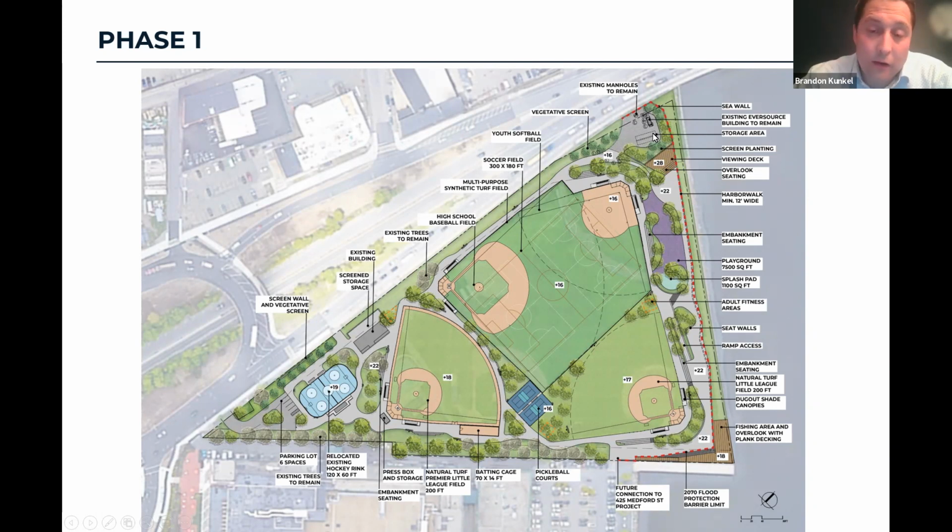We've been in a lot of conversations with Eversource specific to their easements and utilities that run through Ryan. And unfortunately, there's really no good answer or cost-effective answer for addressing that building. That building has to pretty much stay where it is today at the elevation. So we aren't able to actually put a deck over the building. They need to have open air access to it.